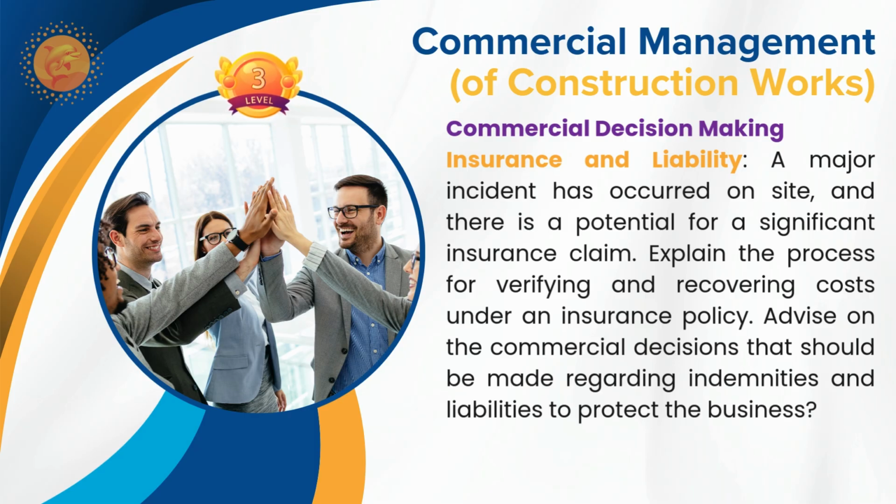The same insurance situation occurred in my current project. A flood occurred in my project, and we faced losses. First of all, when I get the weather alert in advance, maybe 3-4 days before, I make arrangements for the protection of my resources, such as storing the material in elevated areas and clearing the waterways. I take photographs of the proactive measures taken before the incident.